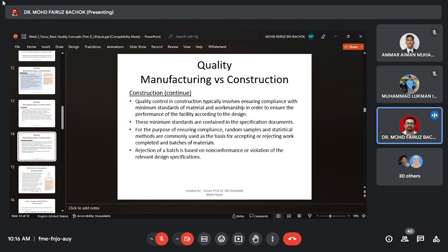After a few months, there was a problem because the concrete could not stand the effects of the sea salt in the water. Because of that, it affected the concrete. And what happened to the contractor? They needed to rebuild that construction, and it took time. All the costs were borne by the contractor. So they had no profit at all and even lost money. But they learned something: we need to understand our site, our environment, where we're going to construct.